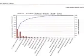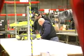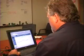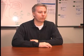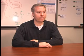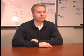With SIS, Holmes' foremen and project managers plan their work with 3-day look-aheads. Doing so encourages teamwork, promotes increased overall productivity, and improves accuracy when planning and executing short-term tasks. Ultimately, that continuous improvement process, by taking the results of the projects and rolling what we've learned back into our estimating process, we end up procuring more work because our price is better, and it's a continuous circle of improvement on into the future.